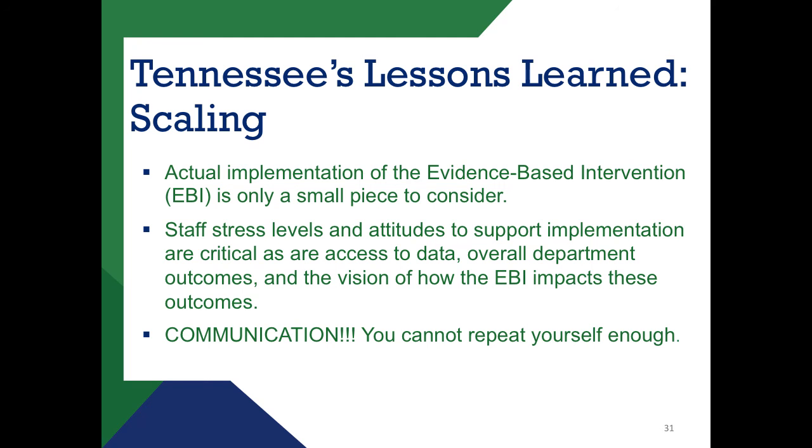In addition to repeating ourselves and making sure that everyone has a shared vision and understanding of what's expected, we take very detailed minutes for all our meetings that are posted on a shared drive. We have very detailed agendas for all our meetings, and my staff have been extremely excellent in putting out those high-quality written products, and also in developing manuals moving forward, and really putting all decision points in writing so we don't keep going back and forth and backtracking. It's, we decided this on this date, it's in writing, we're moving forward, and not changing our mind unless data shows something else needs to be done.